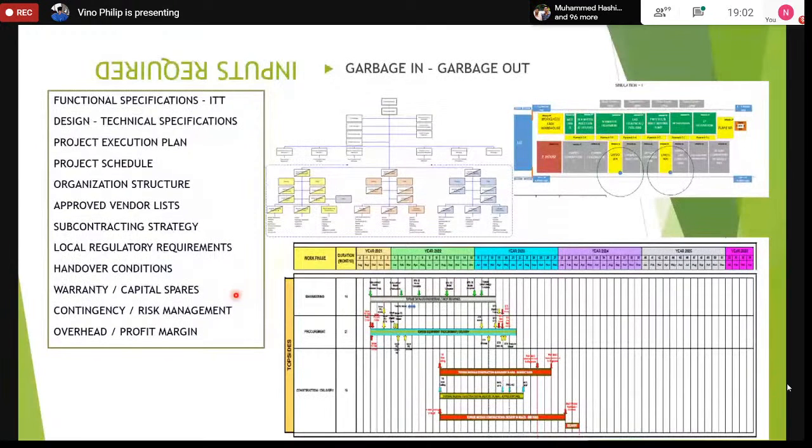So when that starts, we have to change out the big bearings and the turbine blades at that point, and we have to put in a new set. And those are considered as capital spares because those spares are very expensive. You cannot claim for those spares later on in the project. You have to claim for it as part of the EPCI cost input.